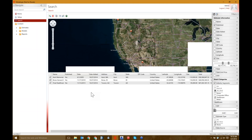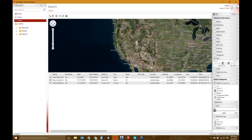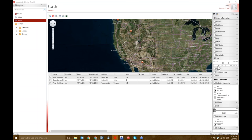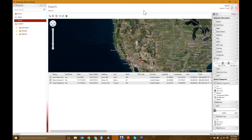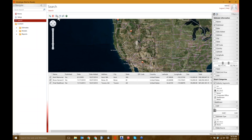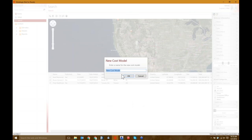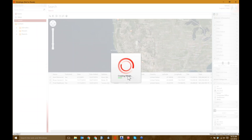Now I have three projects which would be a better sample set. Is everybody able to view my screen? I see you. Okay, just making sure. All right. So I've isolated three projects that are within 92,000 square feet, 125. I've also isolated it based on industry segment, which is healthcare. At this point I can actually create the cost model. I have some tools up here. I can either export this data as it sits now to Excel. But in this case I want to create a new model. I select a location. So we give you the option to create, you know, like a Windows type folder structure.